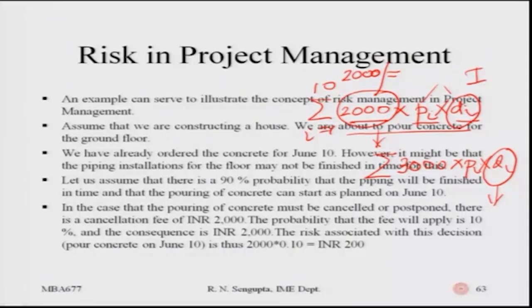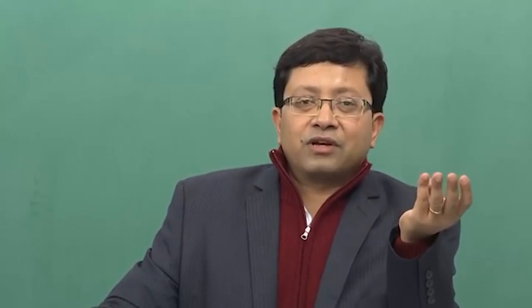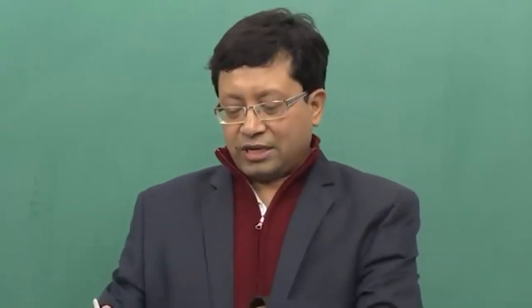Next, consider that the probabilities are also changing, which is absolutely possible. Due to the non-arrival of cement, problems with the cement mixer, or different types of problems, the probability may increase or decrease. In that case, even though I used the symbol PI in both equations, the values of the probabilities would be different. Hence, the total cost of risk would depend on the probability, the number of days, and the rate of loss — two thousand rupees for the first five days and three thousand for the second instance.